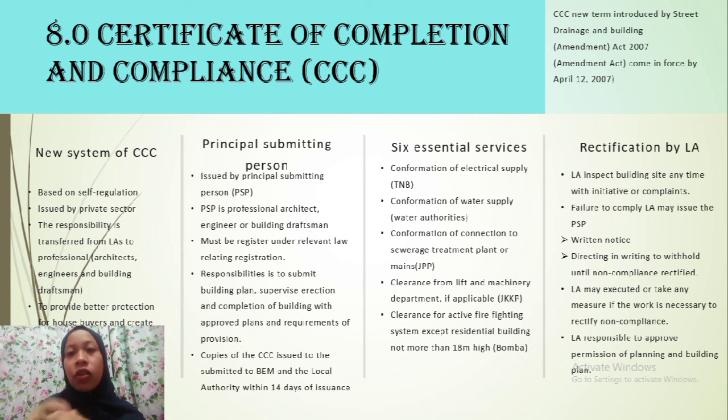So, for the principal submitting person, the CCC will be issued by the principal submitting person (PSP). A PSP is a professional architect, engineer, or building draftsman who submits building plans to the LA for approval. He must be registered under the relevant law relating to the registration.